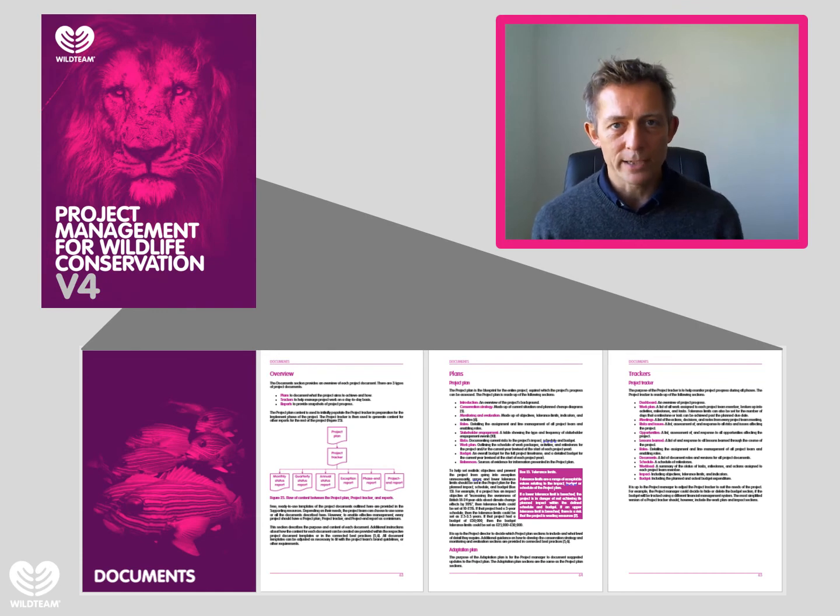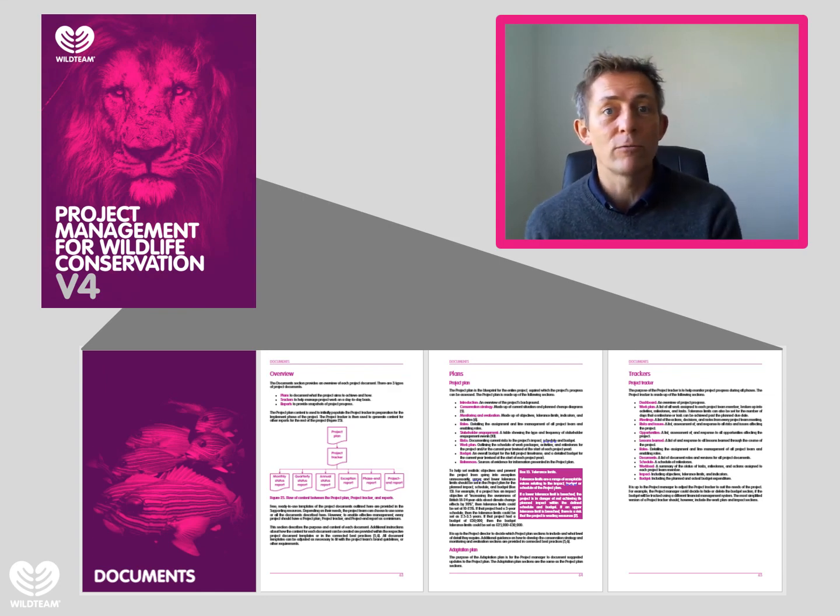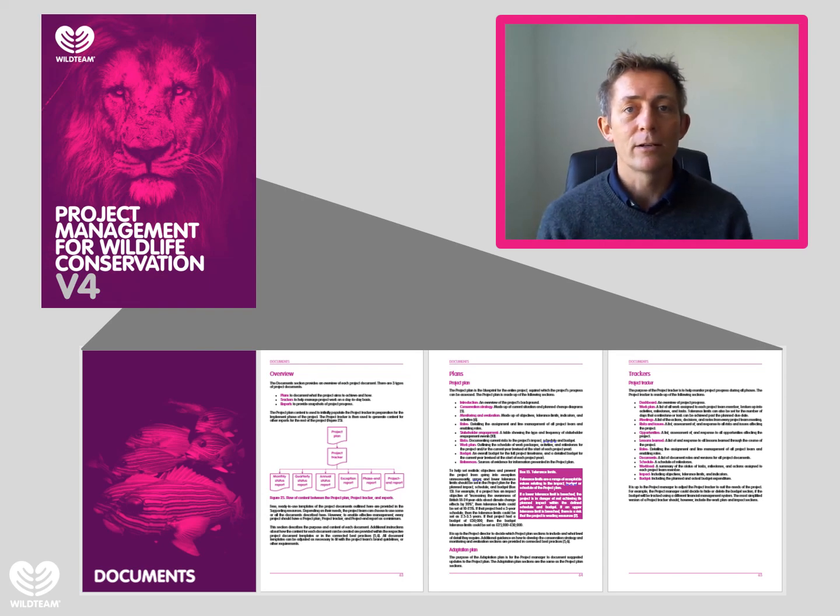Now, throughout this best practice, there are a number of project documents that we refer to, the main one being the project plan, another one being an online project tracker, where all the team can document and update the tasks that they're carrying out. So this document section basically tells you all about each of those documents in a bit more detail, what it's comprised of, and how it's linked to other documents. For example, you can use the contents from your project tracker to very quickly make a project report without creating a whole new content for that report.